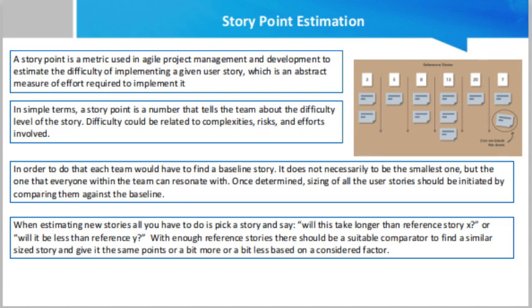When the discussion is closed, each developer and tester privately selects the card that most accurately reflects their estimate. When all cards have been selected, the estimators reveal their cards at the same time. If a consensus is met, it's time to move on to the next backlog item. If the estimates vary, the team discusses until they arrive at a consensus.